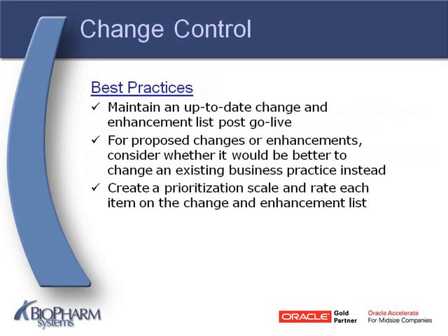When evaluating change requests, our experience has shown that many changes are requested to support an outdated business process only because it has, quote, always been done that way. We encourage business units to consider whether it would be better to improve an existing business process and make it more effective, instead of spending the time and expense for what might be an unnecessary system change. Therefore, all recommended changes should be thoroughly vetted and prioritized prior to a new phase of implementation.